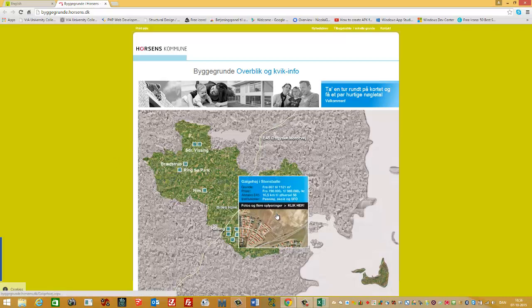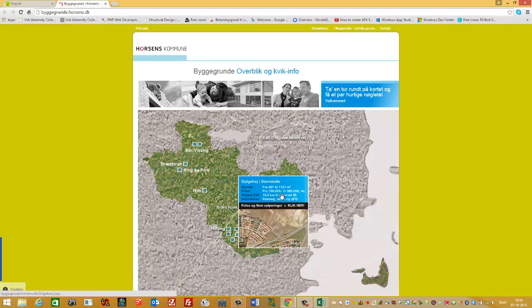I can try to go to Steensbälle. You can see it here. It says the plot size is from 807 square meters to 1,128 square meters, and the price is from 790,000 Kroner to 969,000 Kroner. You can interpolate here. So if you have maybe 1,000 square meters, then the price is approximately 850,000. But you can try to interpolate here.